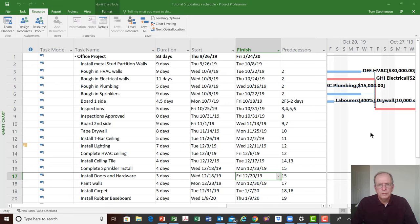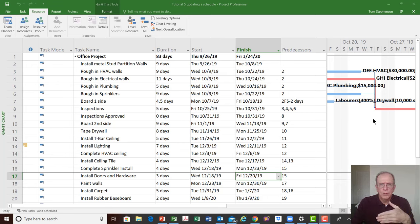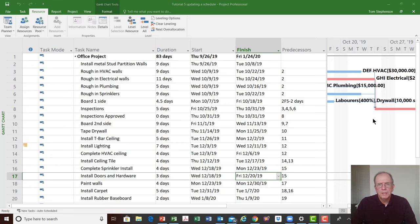The whole purpose of developing a schedule is so that we're able to track it and see where we are, compare where we are to where we thought we should be, and see what the difference is. We call those variances — where you have a difference between where you planned and where you are. So in order to do that we update our schedule. In construction, most projects are updated formally on a monthly basis, but in other projects it may vary — two weeks or weekly.